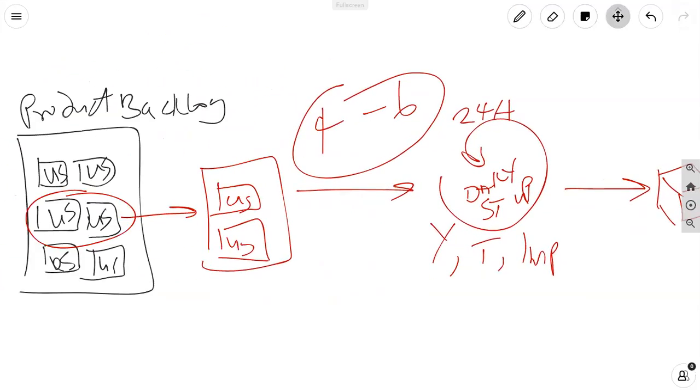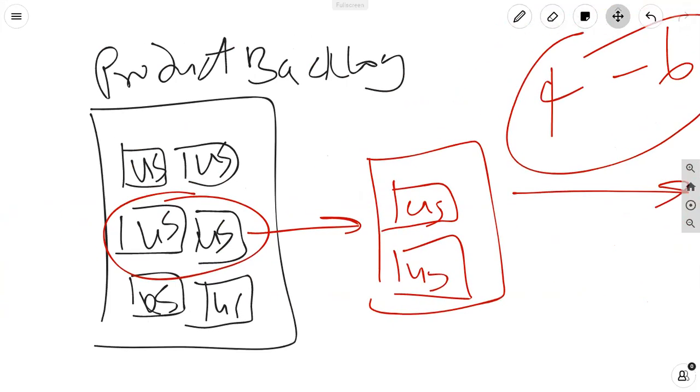And at the end of the day, the way you stagger the planning, what gets into the sprint backlog is determined by the team and the product owner, you see. So the product owner comes up with a product backlog, but the prioritization of the backlog and the sprint backlog being extracted from the product backlog is a team thing.